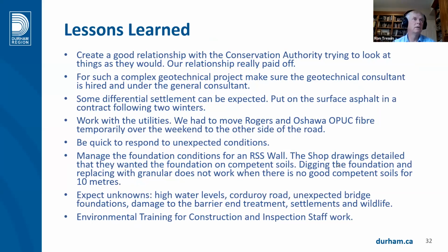Lessons learned. Create a good relationship with the Conservation Authority. Our relationship really paid off. For such a complex geotechnical project, make sure the geotechnical consultant is hired under the general consultant. Having the geotechnical consultant on one side and the general consultant on the other side in the design was difficult on such a challenging project. In some cases, I was in the middle, which is not where you want to be. Plus, we also had the geotechnical consultant disappear during our design.